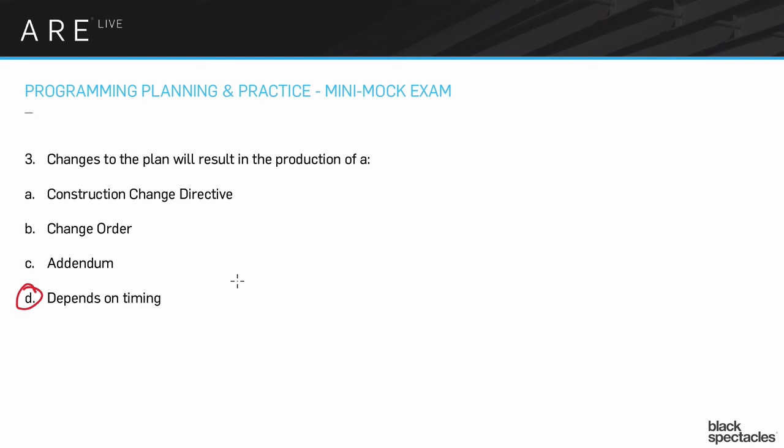But what you do is you take their questions and you assemble—after a while you get questions from various different people and you sort of play it by ear what the logical timeline of the addendum is. But at some point you say, okay, I've got seven questions or ten questions or something. We're going to call it and we're going to give, call this an addendum. And it gets numbered and it gets sequenced. And that addendum is, here's the question that we received, here's the answer we're giving. And the addendum is dated and numbered. It might have general information, contractual information, direct material information.